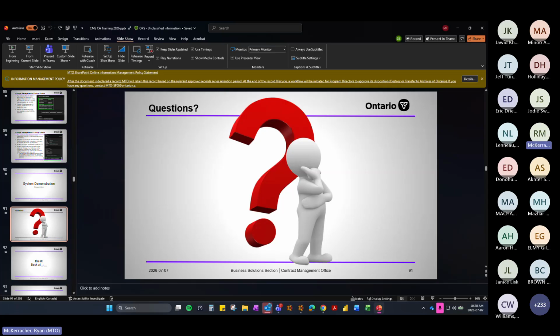The only thing I can say is the change order that pays the compensation request can be fixed. So you can include in your quantum or your rationale. Your quantum is going to be auto-populated with the CSA's recommended net and absolute value that was approved on the CR. But in the rationale, you can put, this isn't what's going to be paid. This is what we received negotiating ceiling for. And then the change order that actually pays it can pay the correct $12 from your example.